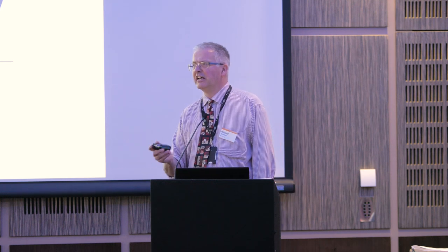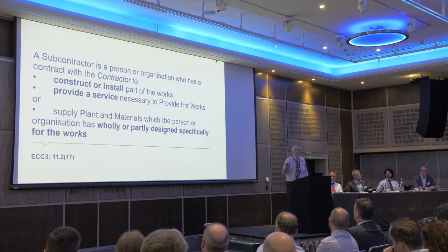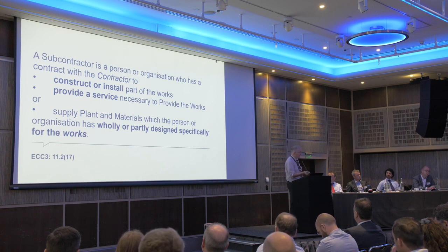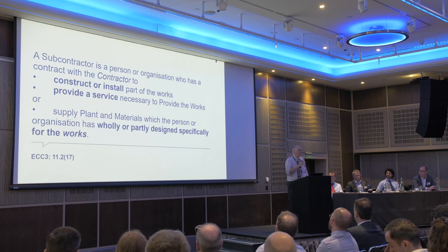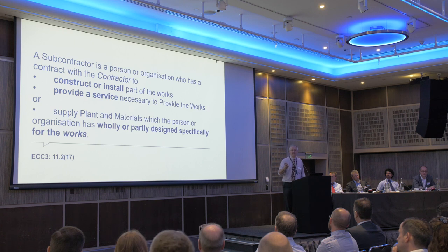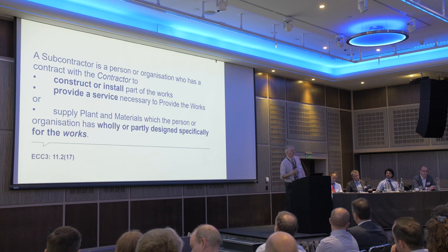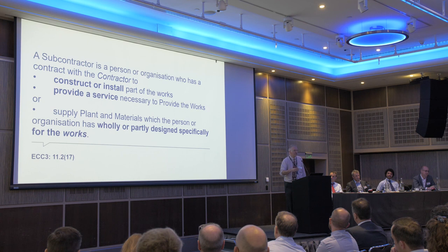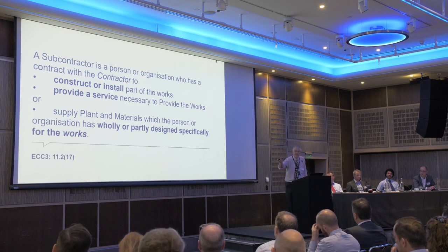Labour-only subcontractors are clearly providing a service necessary to provide the works. And yet somebody will say, back in the schedule of cost components — number 14 or something — we'll pay them as a direct cost to the contractor. There's an incentive for a contractor to convince the project manager that the person doing the cleaning is a subcontractor, so we can get them paid specifically. The very definition of a subcontractor is going to be important and potentially cause issues.